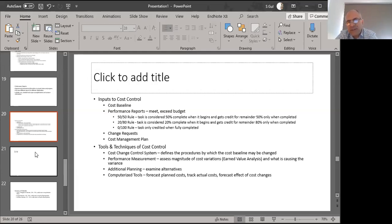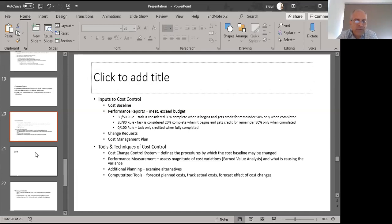Alternatively, we can have a 20/80 mentality — paying 20% at the beginning and 80% distributed across the rest of the project lifecycle — or a 0/100 approach where no money is paid at the beginning and all money is paid at the end. We also have to consider change requests during the execution period; if any change request happens we need to update our cost management plan accordingly. Different tools and techniques are available for control mechanisms, including computer programs to track and match expenses against the plan.